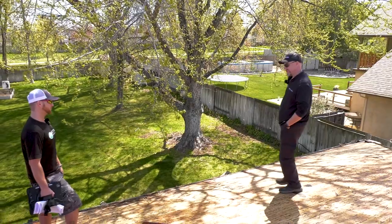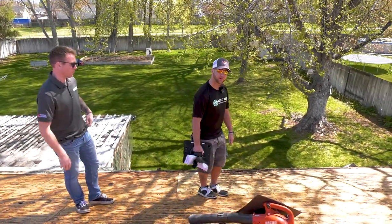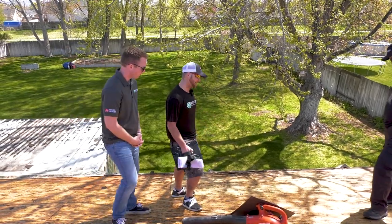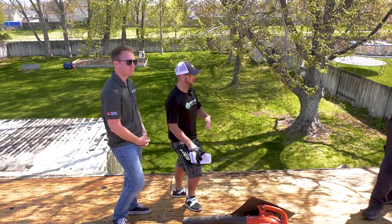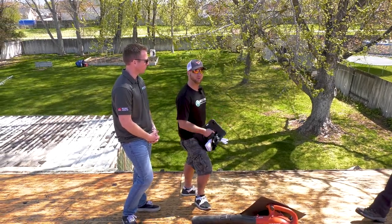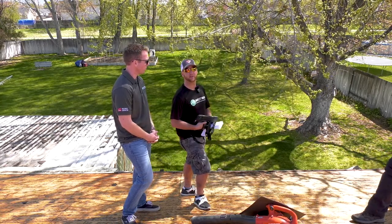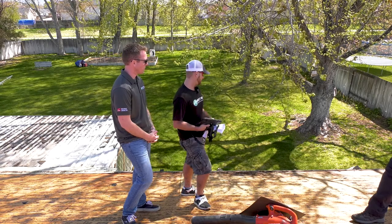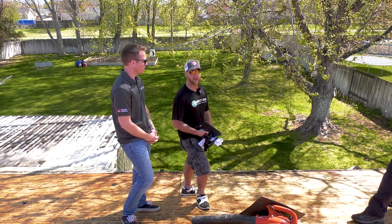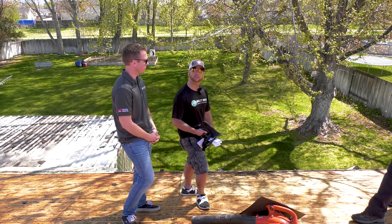What does QC need to do for this? So as the quality control rep in this situation, as you're walking the roof and you discover this, obviously like we just talked about, informing the project manager so he can get the ball rolling on his side. On the quality control side, this is something that we're going to be supplementing for. So getting all the photos that we can to document and then knowing how many sheets we need to get is going to be your job.